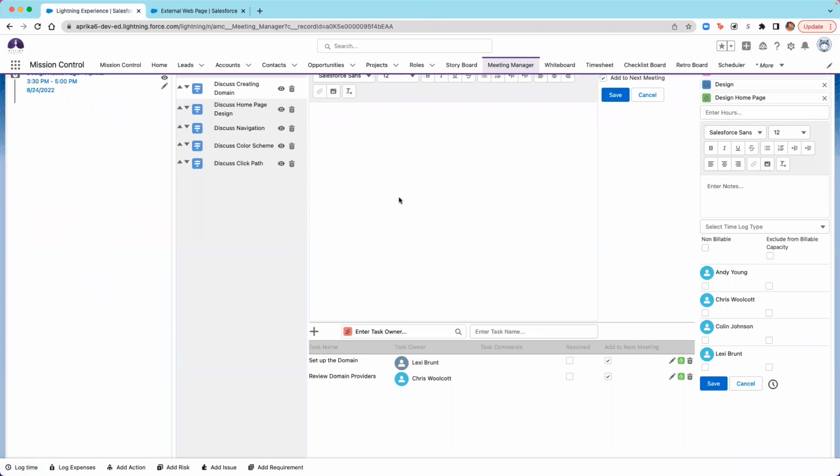Can you have logic on asset roles, such as how a role relates to a project? You can relate your asset role to a project. For example, you can have placeholder roles on your project templates before the work is assigned to actual resources. But there's certain things that you can't do with an asset role. You can't create a Salesforce event with an asset role because that role isn't an actual user within your Salesforce org, so they won't have access to Salesforce events.